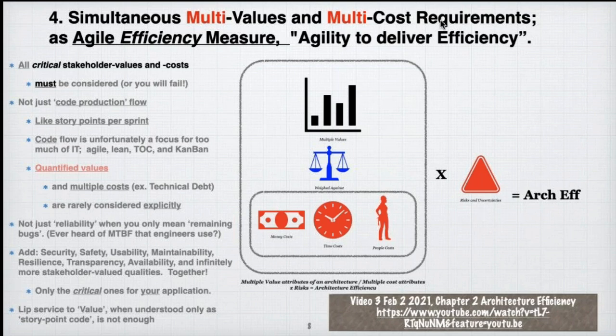Sometimes it's a good idea to prioritize or focus on your top 10 values and say we'll note the other values, but we'll do them when we have succeeded in doing the most critical 10. That's the prioritization idea, and it makes complex systems a little bit simpler. You're not ignoring all 30 of the critical ideas, but you're deciding I'm going to do the top 10 first and master that and see if I have enough resources to deal with lower priority values.